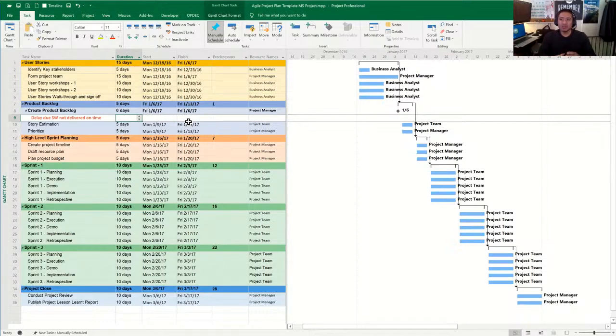My recommendation is not to baseline it because that wasn't part of your baseline from the beginning. And if you baseline it, you're holding yourself responsible for it. So as you are developing this type of impact analysis, it's best to separate that within that task, just like you see here.